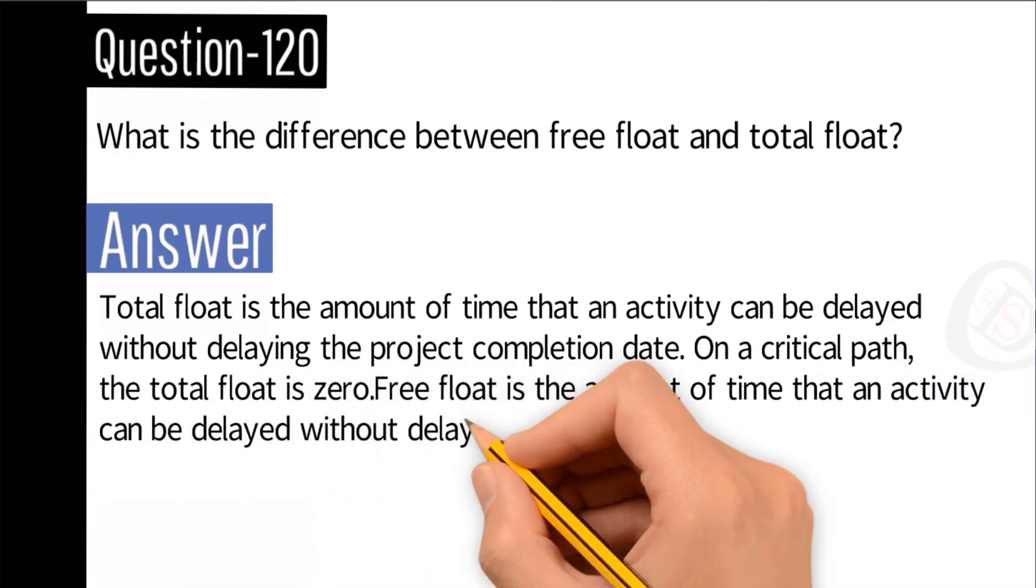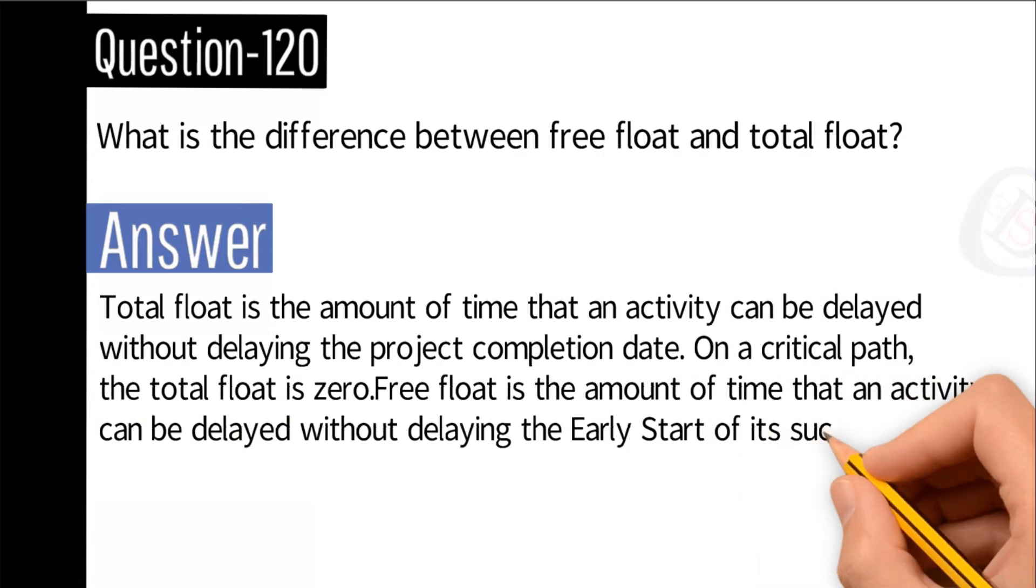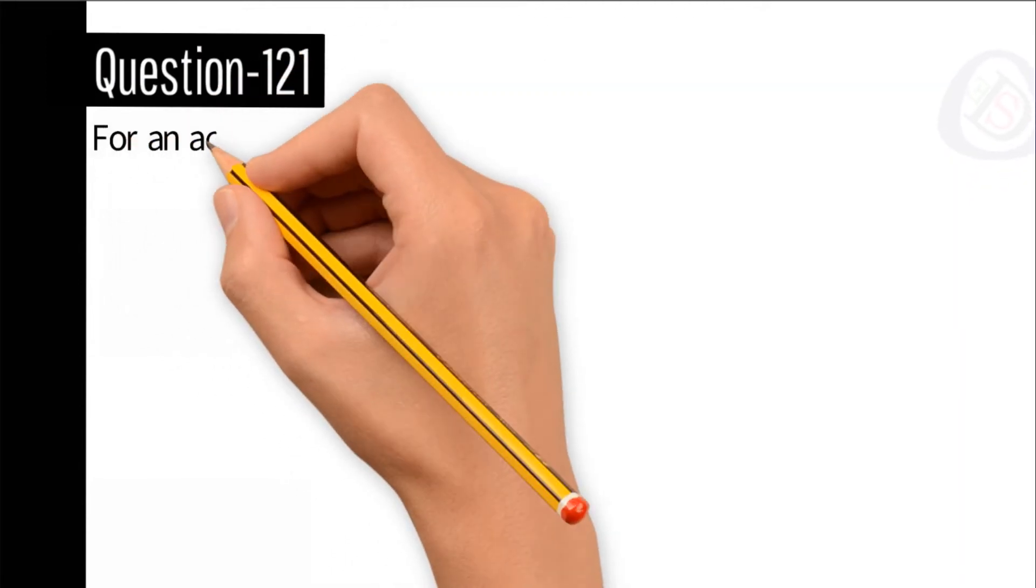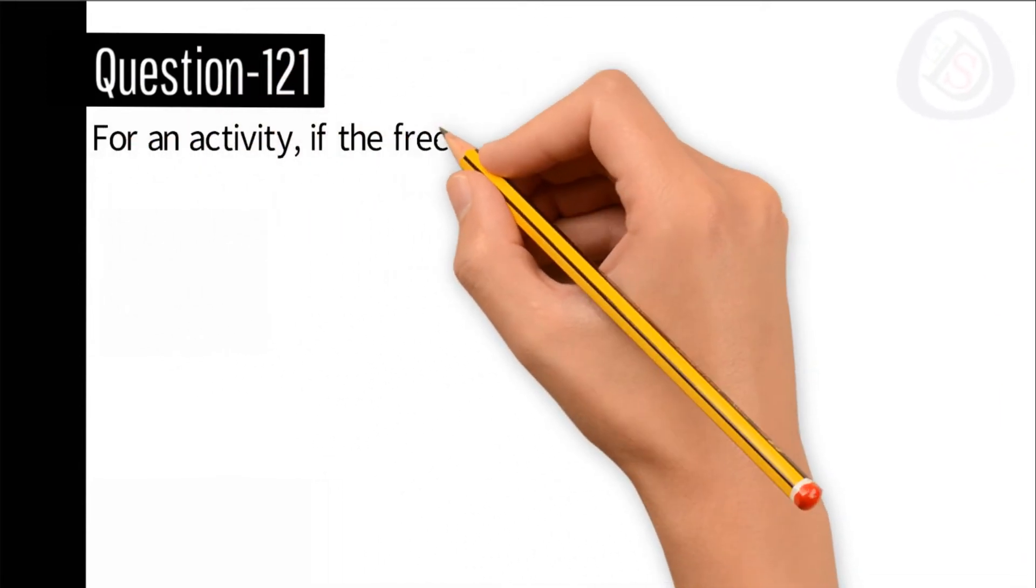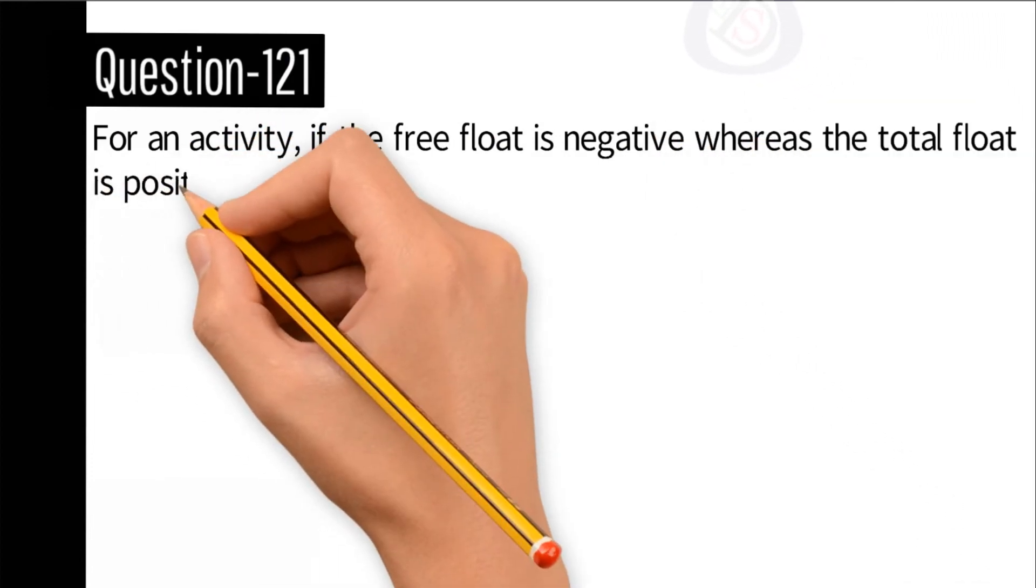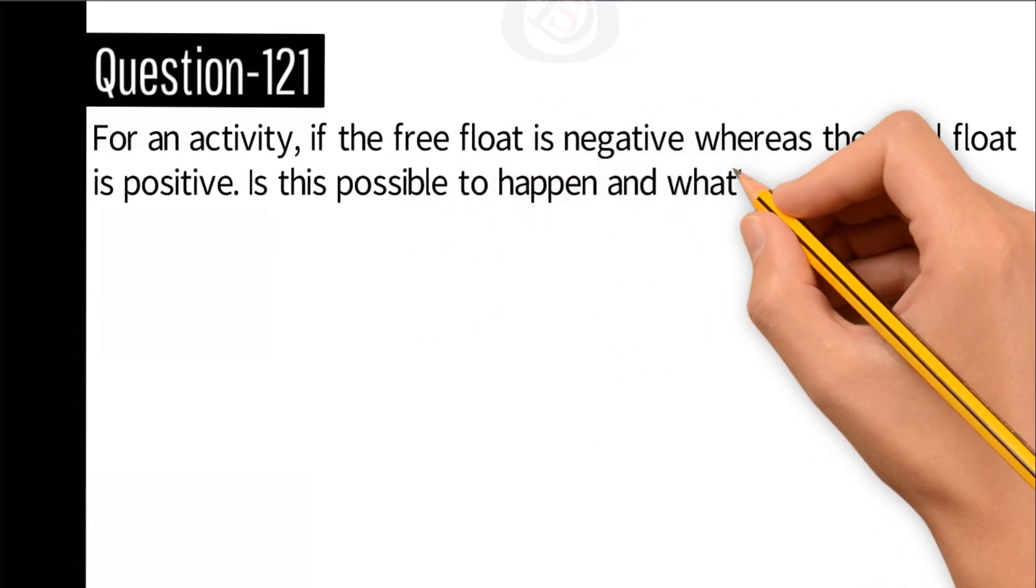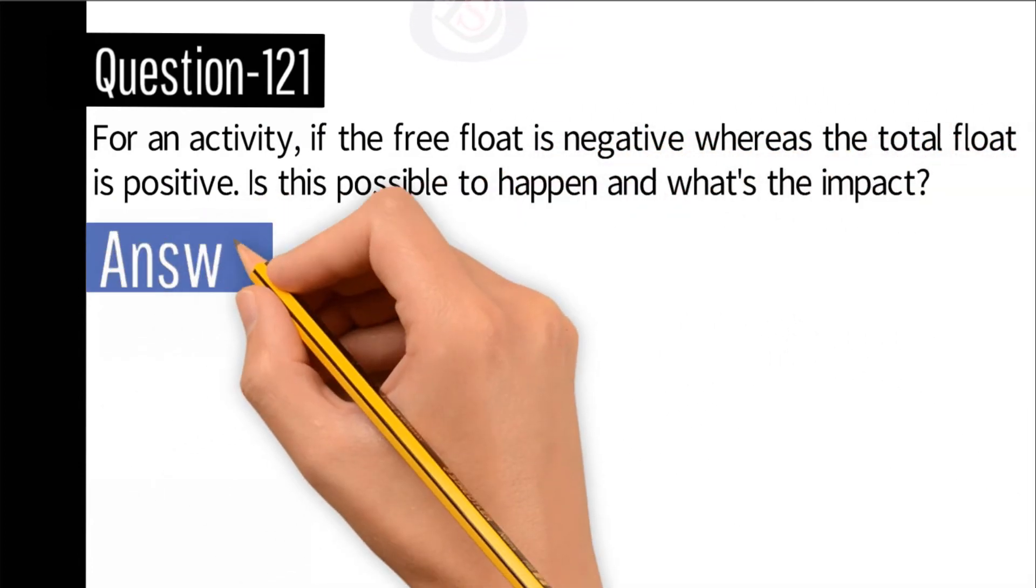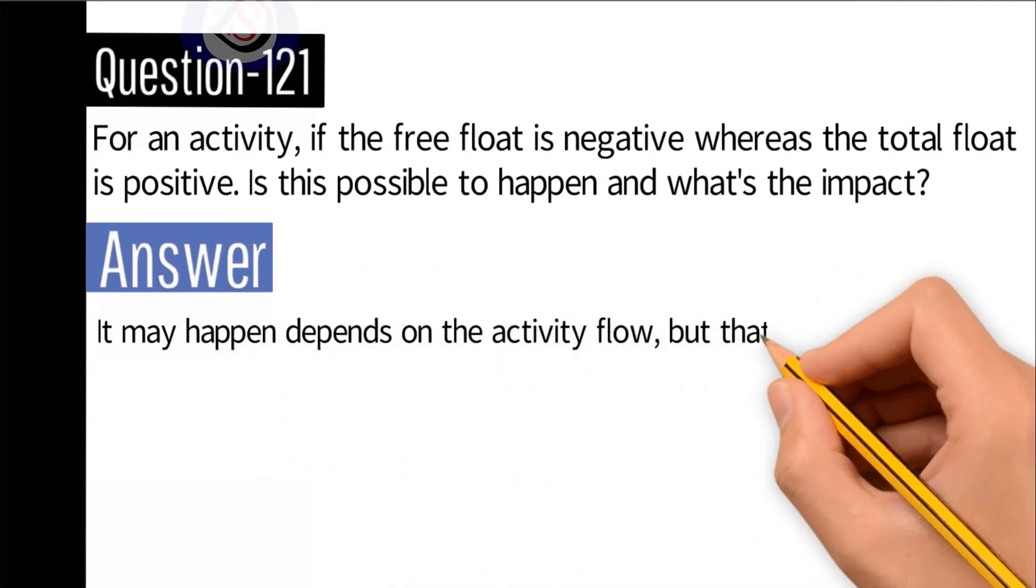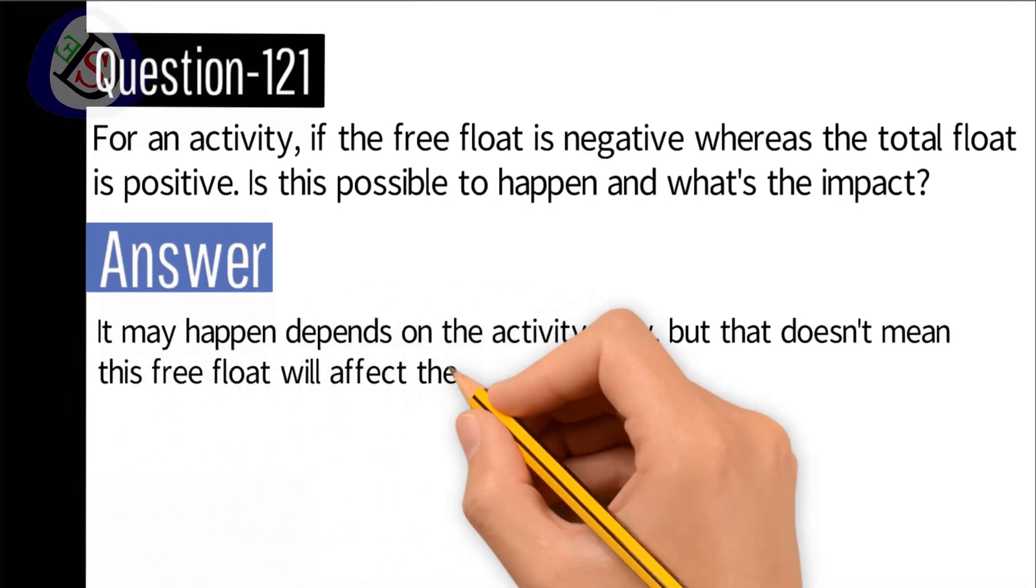Question number 121: For an activity, if the free float is negative whereas the total float is positive, is this possible to happen and what's the impact? Answer: It may happen depending on the activity flow, but that doesn't mean this free float will affect the completion of the project since the total float is positive.